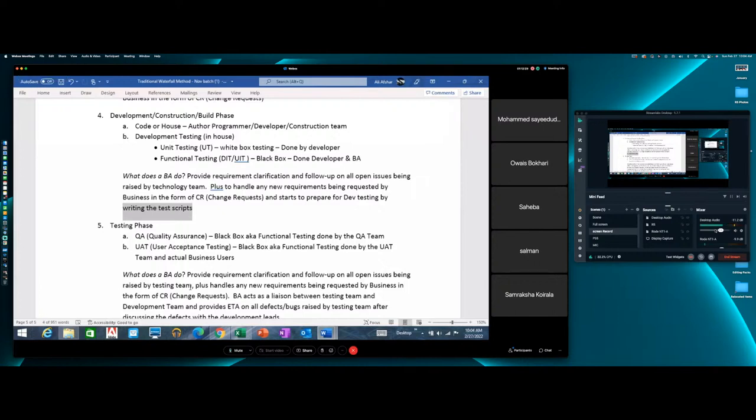To be more precise, on the development plan itself, which is a part of the overall project plan. You understand? You already know development will start on this day and development will complete this day. And from that date, testing will begin. And on this date, testing will end. And this is the date we are going to go live, right? That was all agreed upon in the planning phase. Agreed? Oh, okay. Yes, yes, yes.